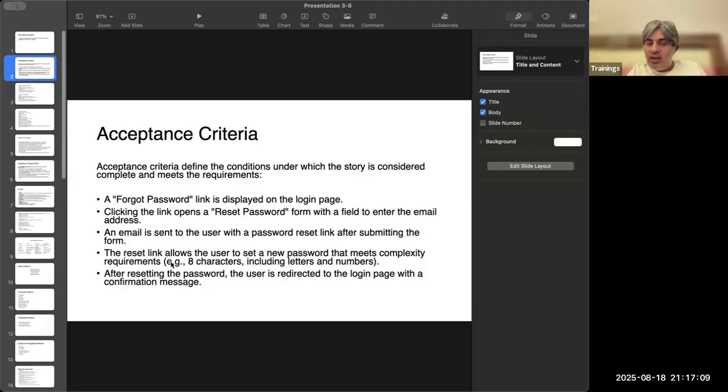maybe they say we need a SHA-2 or whatever is the security algorithm. Based on that, our password should be based on some security algorithm. Architect says, boss, that capability we don't have. So that technical feasibility is not there with us. Then what is the alternative? Then PO says, okay, I will accept an 8 letter password for now. I will talk to the stakeholders. Maybe in the next update, when we do enhancement, we'll do that. So this sort of negotiation happens in the grooming call.